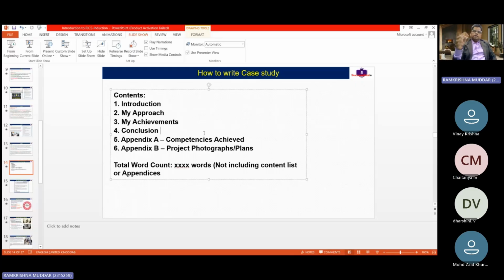Then the third option will be to divide the scope. For example, if he has to give 1000 m cube of concrete, divide the scope. Let him supply only 500 m cube of concrete. The remaining 500 we will give to another supplier. Understand? So in this, the continuity of the project is there. There will be no impact in terms of delay in the project. At the same time, you're also saving the money. With the second supplier for the remaining 500 m cube, he can negotiate the rate. So these are the three options.